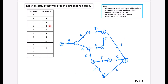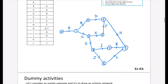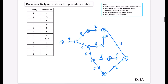To read the network: to find what H depends on, look at what flows into its start node — that's D and F. To find what G depends on, look back and see it's just C. After completing exercises 8A and 8B, I recommend trying exam questions on drawing these networks because they do get quite tricky. Come back in the next video where we'll look at adding dummy activities to activity networks.